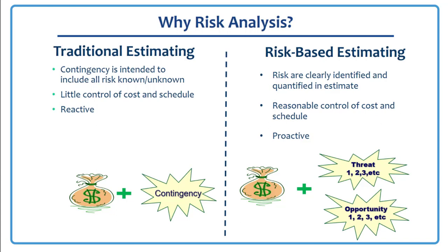So you may be wondering, why do we need risk analysis? Well, in traditional cost estimating, what we've done is develop a cost for all of the planned activities for a project and throw in a blanket contingency to cover the unknown.